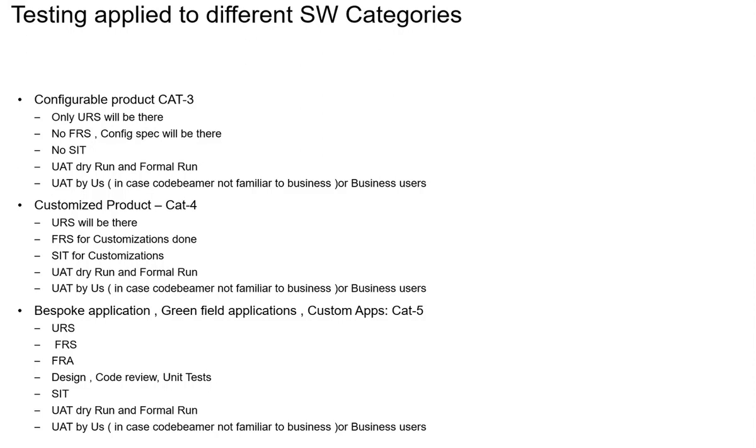The remaining 90% is standalone. It has come as a package. For that 90% area, if you say you are going to write 100 or 200 test cases, it's not going to work out. The 10 requirements they are modifying, or the 5 requirements they are newly implementing, will come as a functional requirement specification because they are doing customizations. Those customizations will be captured as part of the SRS, and the FRS will come into the picture there.